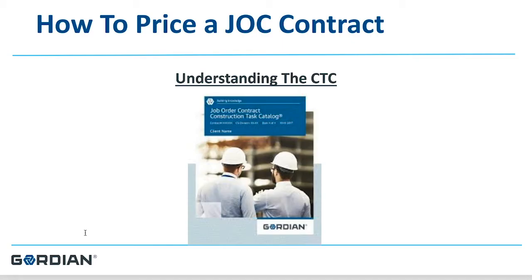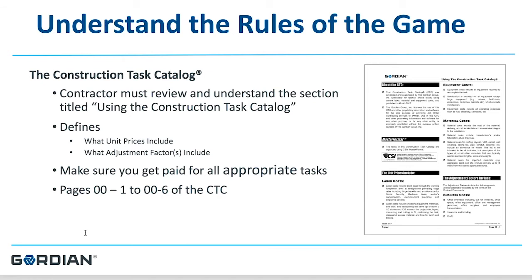There is a risk of a low adjustment factor — you might not make very much money on any of your projects. And if you bid too high, you may not be awarded too many job orders. As always in the competitive bid market, there's a sweet spot, so bid responsibly. How to price a JOC contract can be one of the biggest challenges when developing your response. Understanding how the CTC is put together is the first element, and understanding the rules of the game is another key element. Be sure to read the six to seven pages of the section titled 'Using the Construction Task Catalog' for more tips and rules of the game.